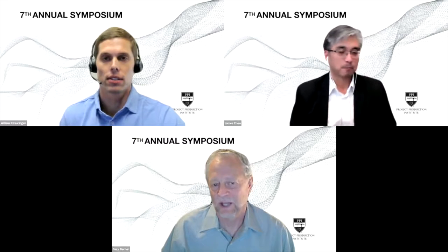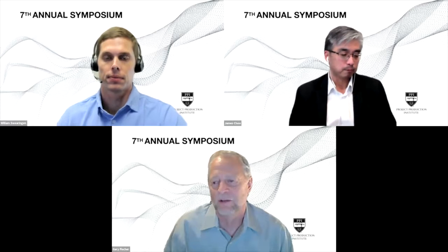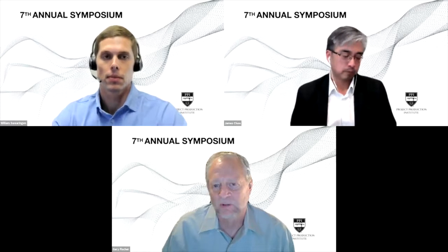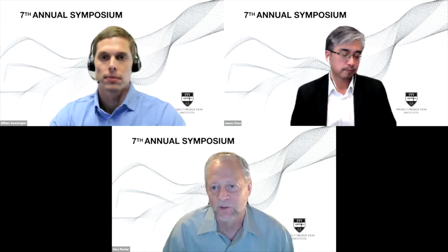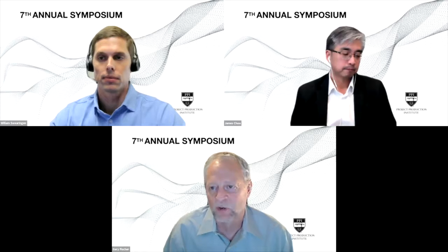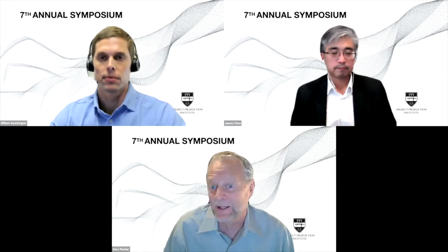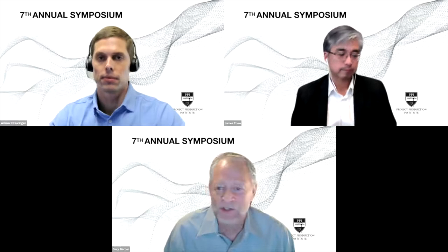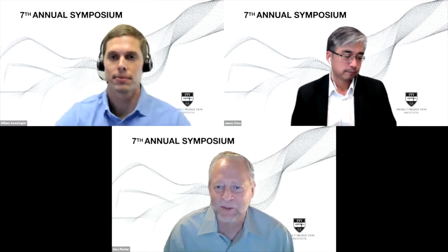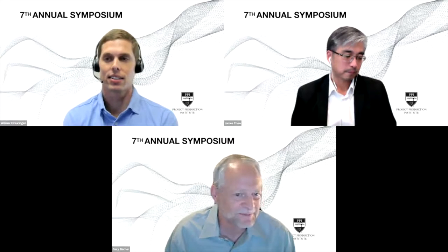Yeah, I think you're spot on. Traditional project controls don't provide you any flow information, and only provide you earned value information. So it's just an apple and an orange. And I think the historical practice is project controls, not production management. And so that's the shift we're trying to make. But when you see it, it's pretty compelling. So maybe seeing is believing, and hopefully we got a few more believers here after participating today.